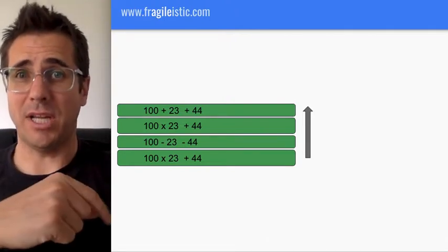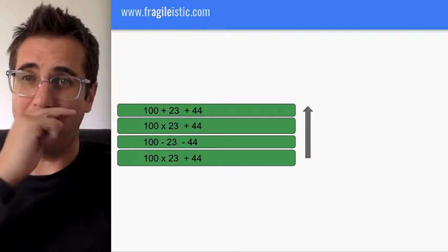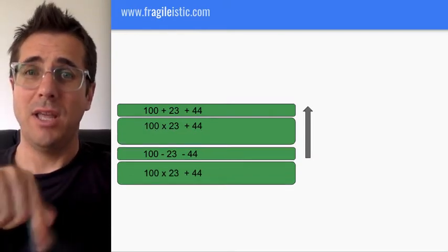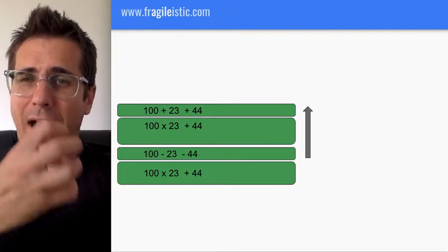First of all, you need to prioritize. You're going to work from the top down. So that's absolutely, before you even start planning, make sure your refinement session finished with prioritization. Make sure you start your planning with prioritization. Then size them. And size and complexity go together. So how much of that can we do?